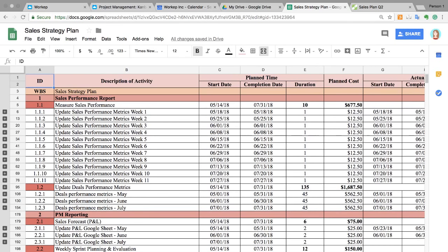Whereas waterfall method is not short-term planning at all. So sometimes you can have activities with durations of hundreds of days or a duration of 1 hour. So it's very varied, and I honestly feel like the best way in which you can manage these types of estimates is by first laying out all the activities that you need to do, and then analyzing how many days each of those activities you think is going to last.